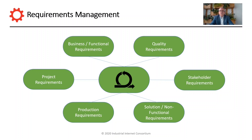Stakeholder requirements are typically a softer set of requirements that might not directly find their way into the RFP document, but where it's up to the project manager to take care of this and translate it, for example, to functional or non-functional requirements. And then last but not least, you have project requirements that deal, for example, with budget, timelines, and key milestones.